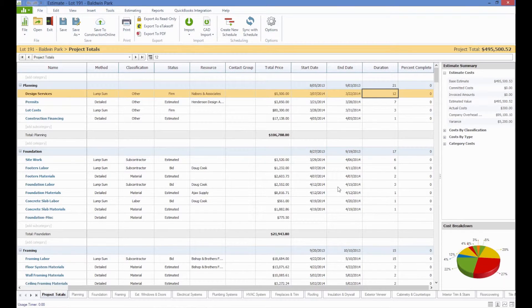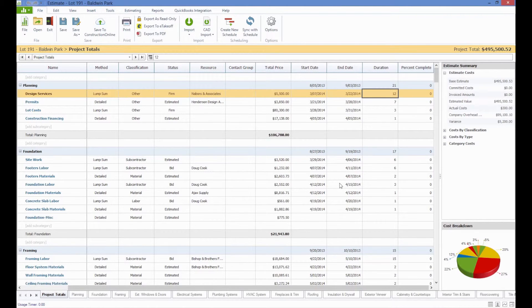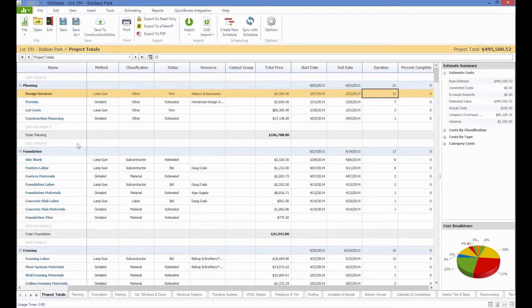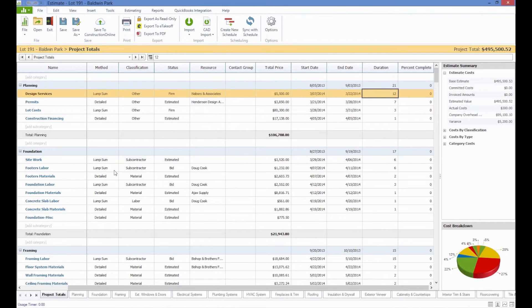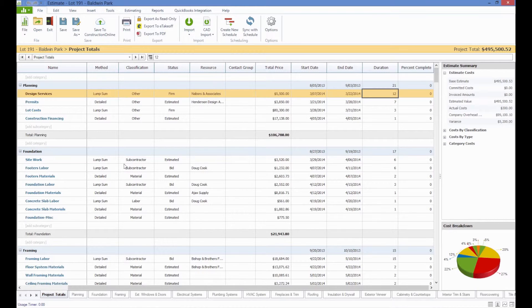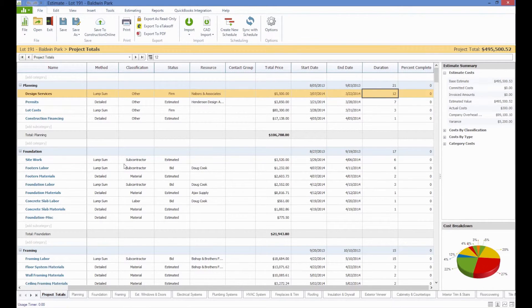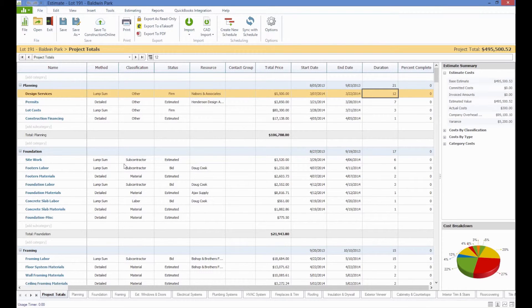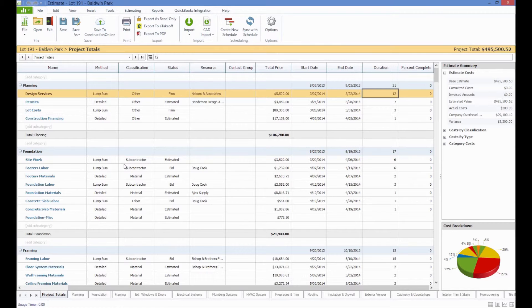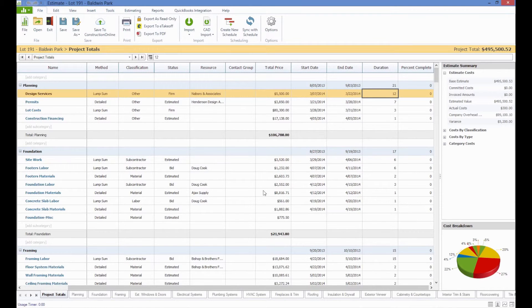The important thing to take note of when syncing, however, is that information is transferred between the two files by matching up the names and the hierarchy of the estimate categories with the names and the hierarchy of the scheduled tasks. Therefore, if you want to sync a schedule and an estimate, you'll have to make sure that you either create the schedule in the same format as the estimate, or simply create the schedule from the estimate as we have just done, and Construction Suite will make sure that the format is correct for you.